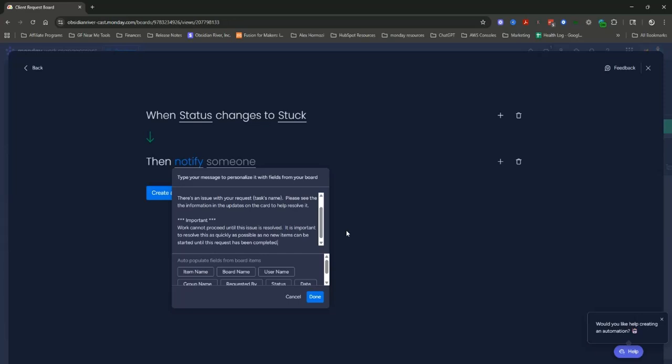I just like to remind them of the flow. If an item is stuck, we don't pivot to something else. We fix the problem and move this one on through the process until it's done. That just keeps your work queues clean and keeps everything from getting really muddy.